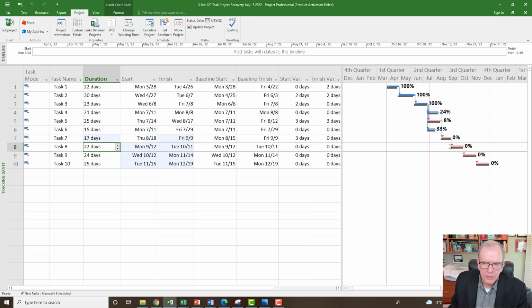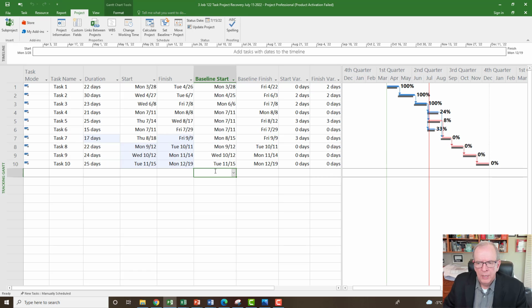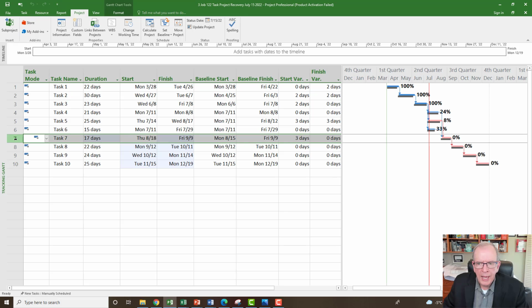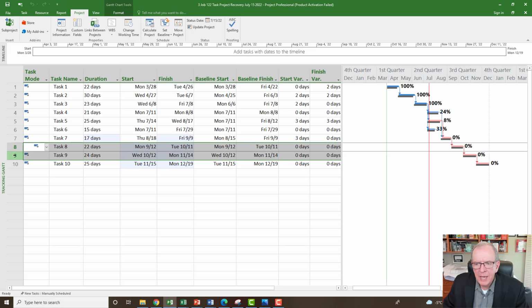And I've got to make sure that, if it's a construction project, this trade partner is in agreement with bringing extra resources or what have you that I use to shorten this project. So you've got to make sure that all those things work. But I've saved it. Now I've got this hierarchy in my file structure that I can follow, which is great. Now maybe I've got coming up something new and something different. Something's changed in the project. So maybe task 7 has a change order between task 7 and 8.